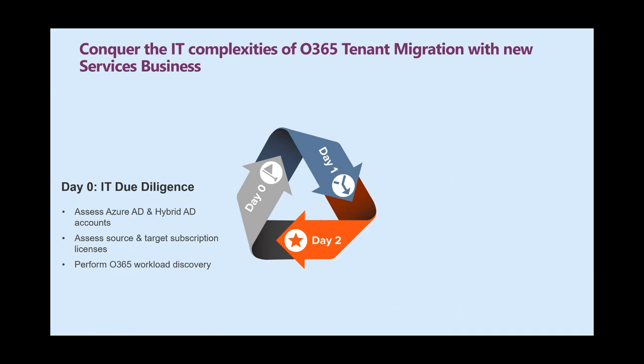So in day 0, really do an assessment around Azure AD, AD on-premises, hybrid AD accounts. Check the licenses. Maybe you have to give some licenses back to Microsoft. Maybe you have to purchase a few more licenses, because in the past you were on E3. Now the new company is on E5, and you have to purchase more licenses.